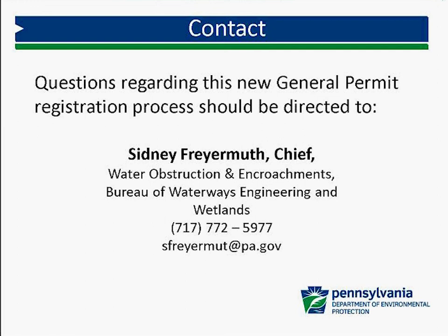Are Act 14 letters and delivery proof still required as part of the registration package? Act 14 letters were never required with a registration package. This has been a misnomer for quite a few years. Part of your registration process is when you submit a GP registration to the Commonwealth or the County Conservation District, that a copy be sent to the municipality and the county. We don't require proof that you've done that. Act 14 requires that, but that's under the joint permit application, not the general permit.